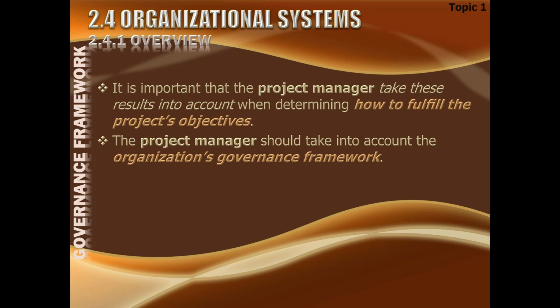Number two, the translation of governance from framework into the policies and procedures by the management should be there. Number three, these policies and procedures in accordance with the organizational governance framework must be implemented. Implemented means that there should be a check and balance system which actually ensures that these policies or procedures are being followed. And number four, because it was law to follow these things,